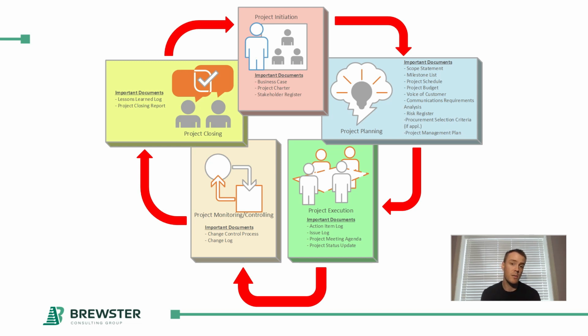Your project closing report, that is a report that essentially releases the resources from the project. So we talked about at the very beginning your project charter containing the authorization for your project manager to wrangle the resources, where your closing report is essentially the authorization from your executive sponsor to release those resources back to the other activities that they have at your particular business.